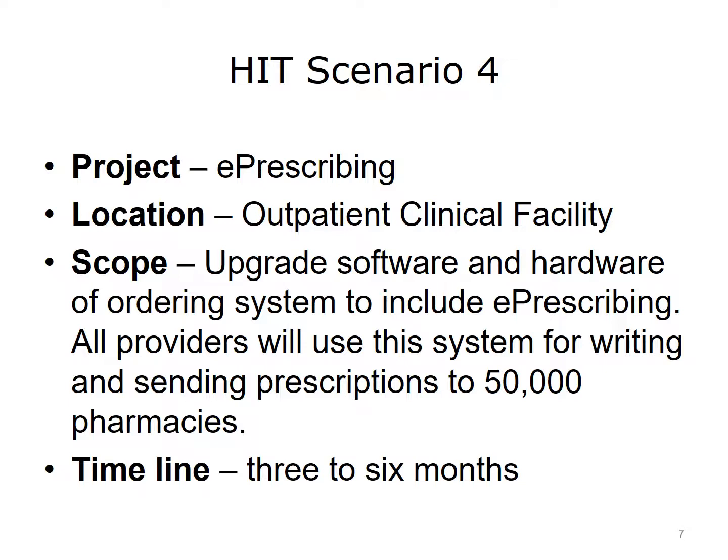The team that such a project would require would depend on the size of the office. If it's a small community physician's office, a project manager and an office coordinator would be adequate to work with a third party to set it up. If it's a large multi-physician hospital that will be developing its own system, the project would require a project manager, several office coordinators, hardware and software personnel, as well as a few of the healthcare providers to ensure that the final product meets their needs. Whether the system would be implemented in a small or large organization, the providers and staff will require training support. Implementing an entirely new system would probably take about 6 months.